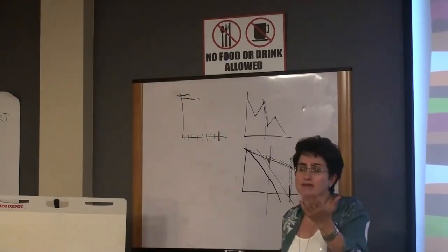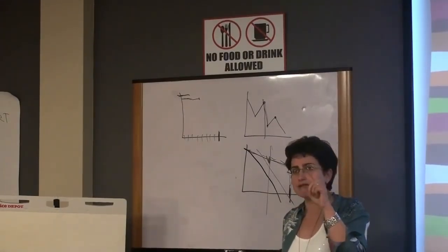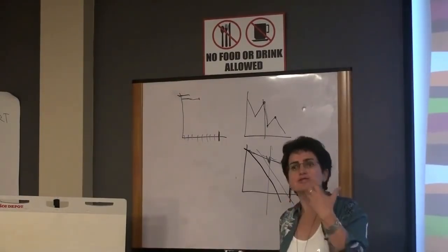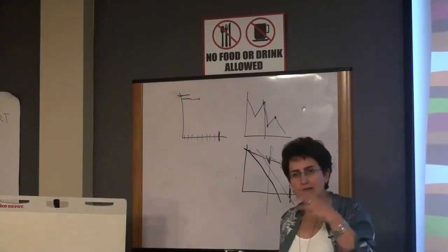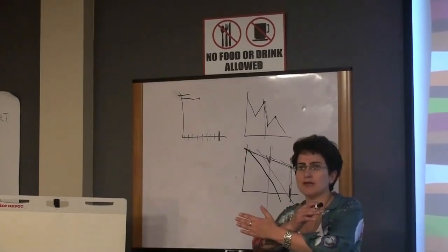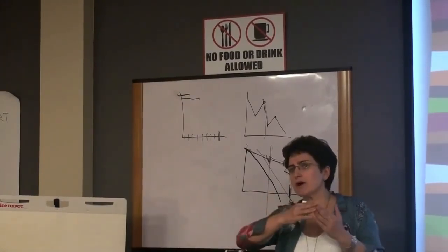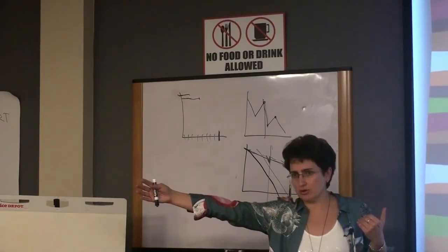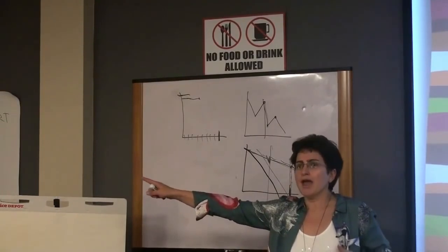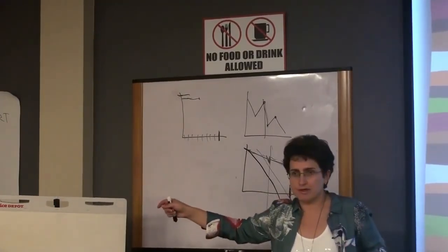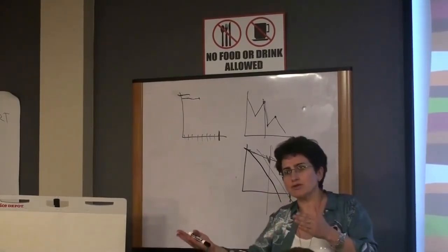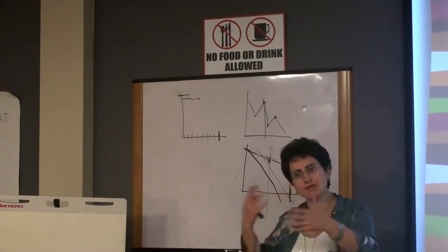No, it all depends, because remember, in agile development there are no standards on how you should behave. It is recommended that you trust your team, and if collectively the team decides not to continue with the sprint, then this development terminates and you start another sprint. You are talking about the entire project, whether it should be killed or not. That's a longer story, because then you need to reevaluate all the product backlog and see if at least some of the features make sense. If you cannot deliver all of it, can you deliver some of it? If you can deliver some of it, should it be this team or that team? So it's a little different story.